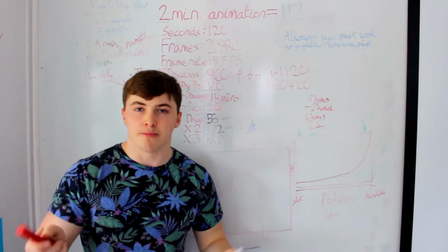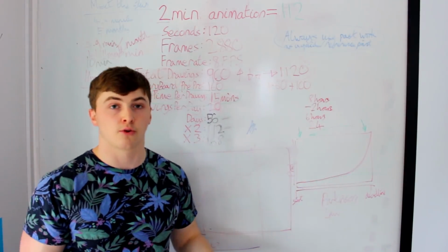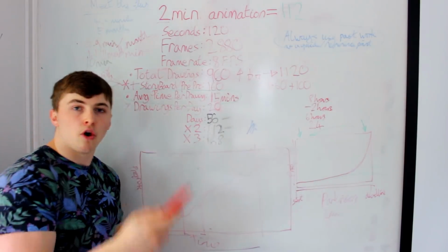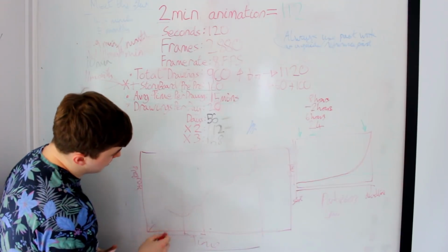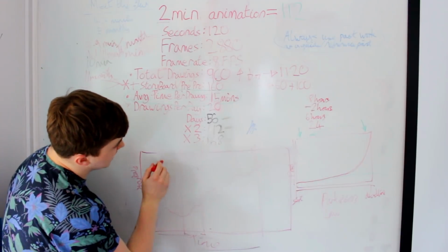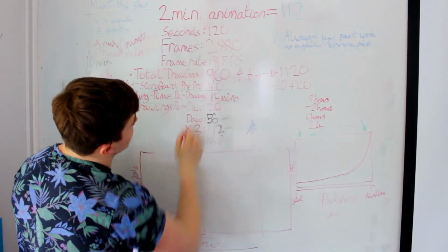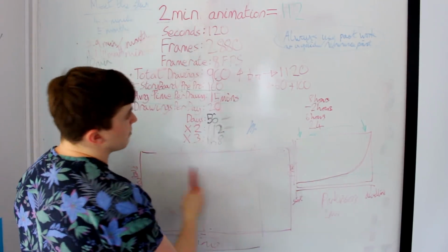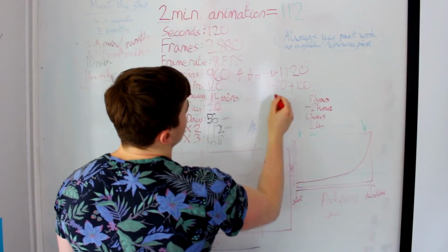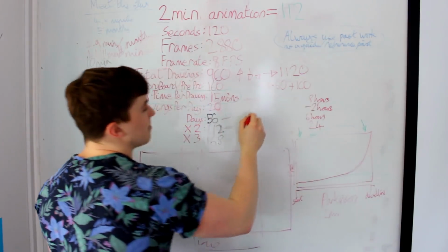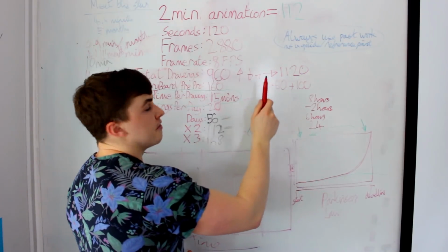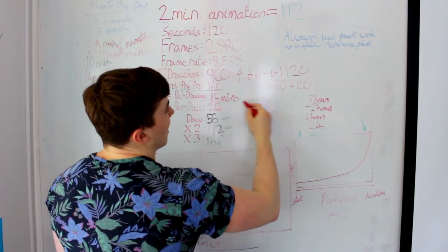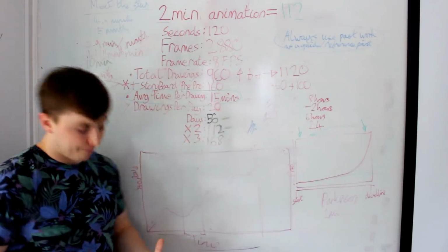Two quick tips to make your process quicker and more efficient. During this pre-production phase, take one scene, and for that one scene, take it all the way to post-production and finish it. So during your pre-production, you've taken it from storyboard, you've animated it fully, you've colored it, you've composited it, that's your character. It's there now.